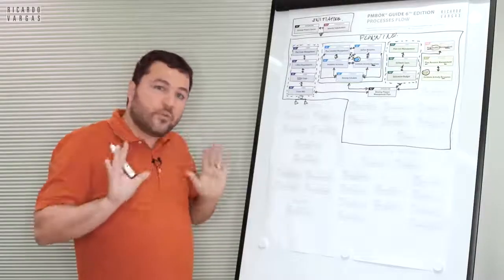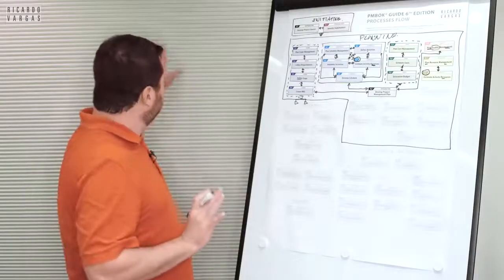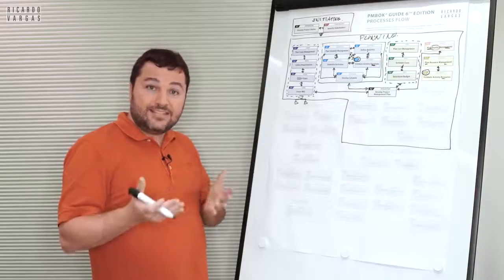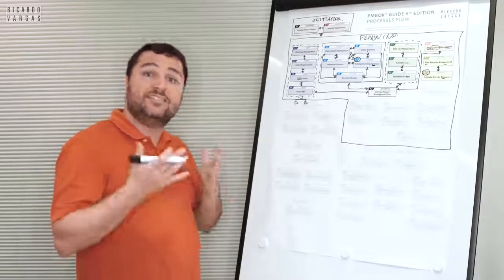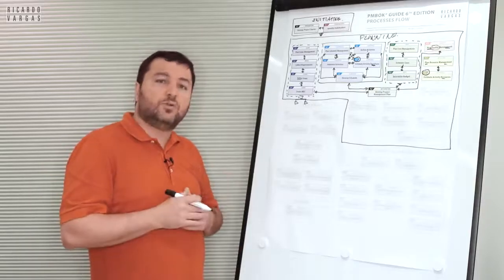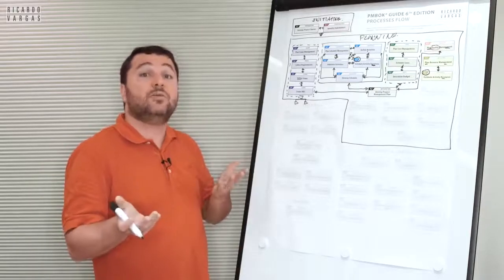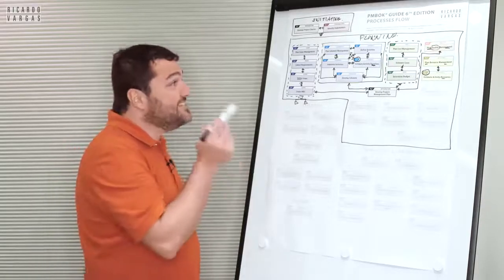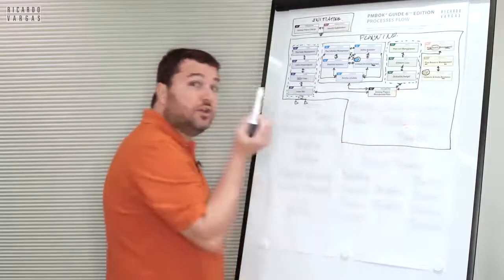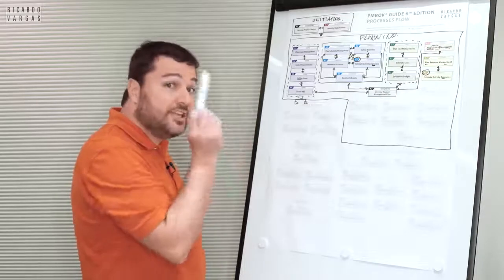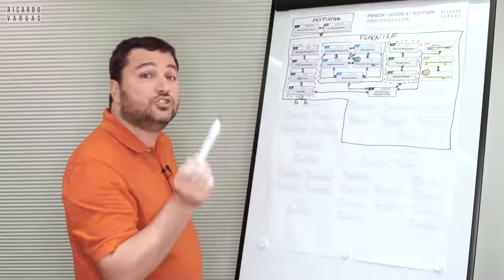Let me give you a very super simple example. Let's take this wall. Say one worker can build this wall in 10 days. It's reasonable to say that 2 workers can build it in 5 days. So this is exactly what I'm talking about here. Because most of the tasks, I'm not saying all, are effort-driven.